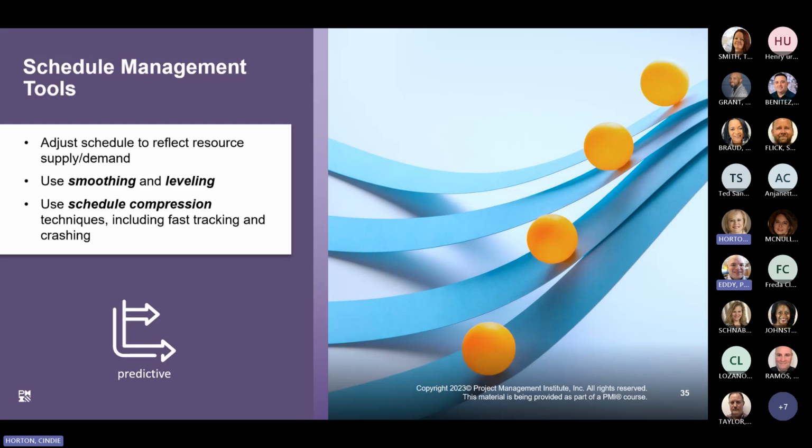but remember that the schedule model is typically changed using our formal change control procedures. Smoothing and leveling techniques can help to compress the schedule without over budgeting your resources. With resource smoothing, the project manager optimizes the resources without extending the schedule. Since the schedule cannot be extended, the project's critical path and completion dates need to remain the same. The project manager must be careful and avoid any delays because it might affect the critical path. Time is crucial in resource smoothing. The schedule is fixed, therefore resources must be optimized accordingly. So the key with resource smoothing is really looking at how can we optimize our resources.